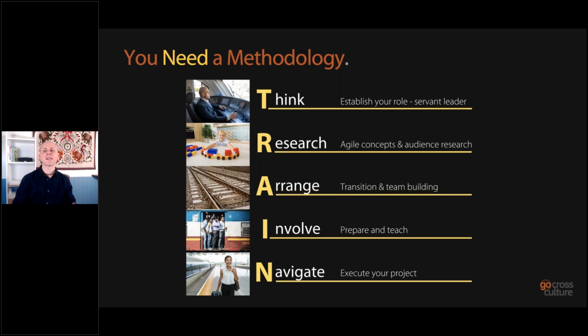And what this means is taking the team from the vision of the project. So what is the vision of the project? The starting point is to ask the customer, what is your vision? What do you want out of this software? And right through to detail, going into the next stage of breaking that down into epics and then into sprints, and then delivering working solutions into your organization in record time.